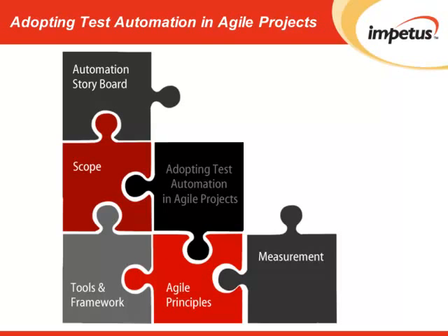So by making these iterations, customers have more control over the system and can measure development through different reports generated by the tools. Now, it's always a good practice to include the development and testing metrics while measuring the sprint progress. By combining information from engineering and testing, a clear and transparent status is generated and then shared within the team.